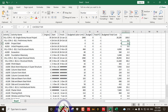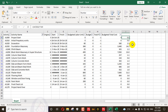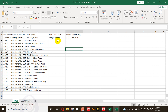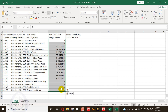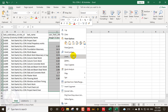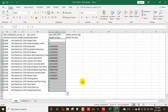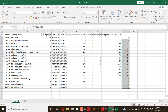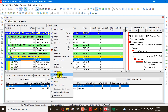In the exported file, there is a Weight Percent Labor column where I'll paste my weightages calculated earlier. I'll apply the filter and remove the blank rows so WBS rows are hidden. I'll copy the weightage values, paste as values into the file, then right-click and format the column as text. Save with Ctrl+S and close the file — if you don't close it, it will not import properly.